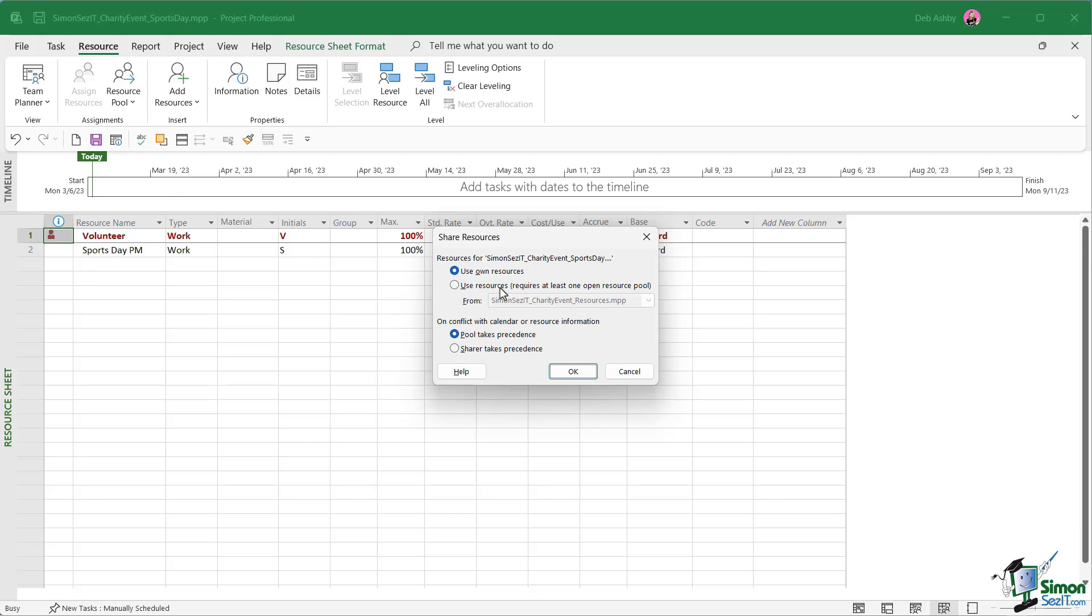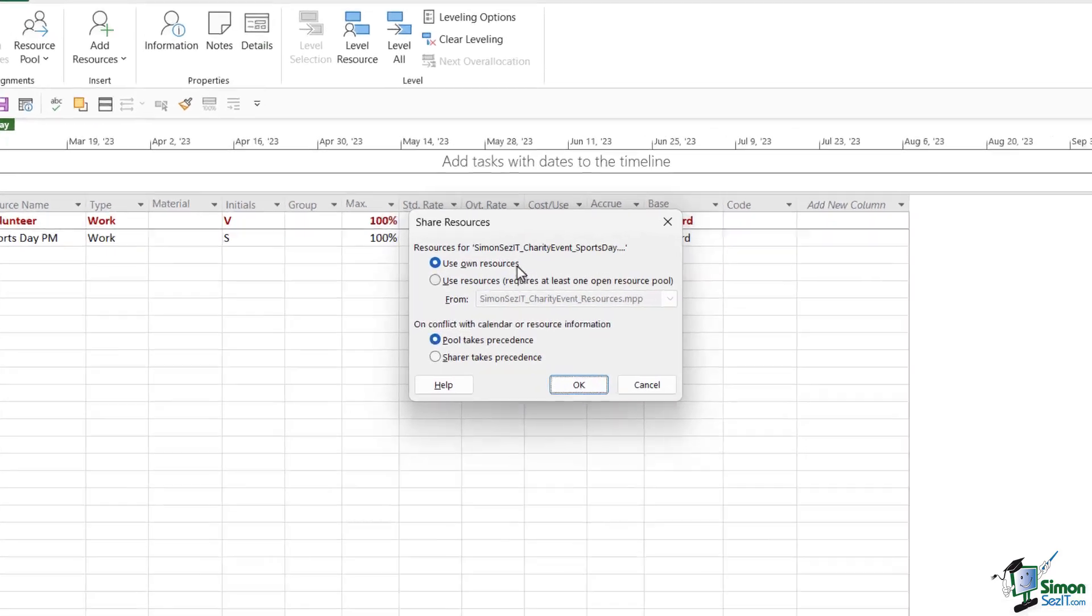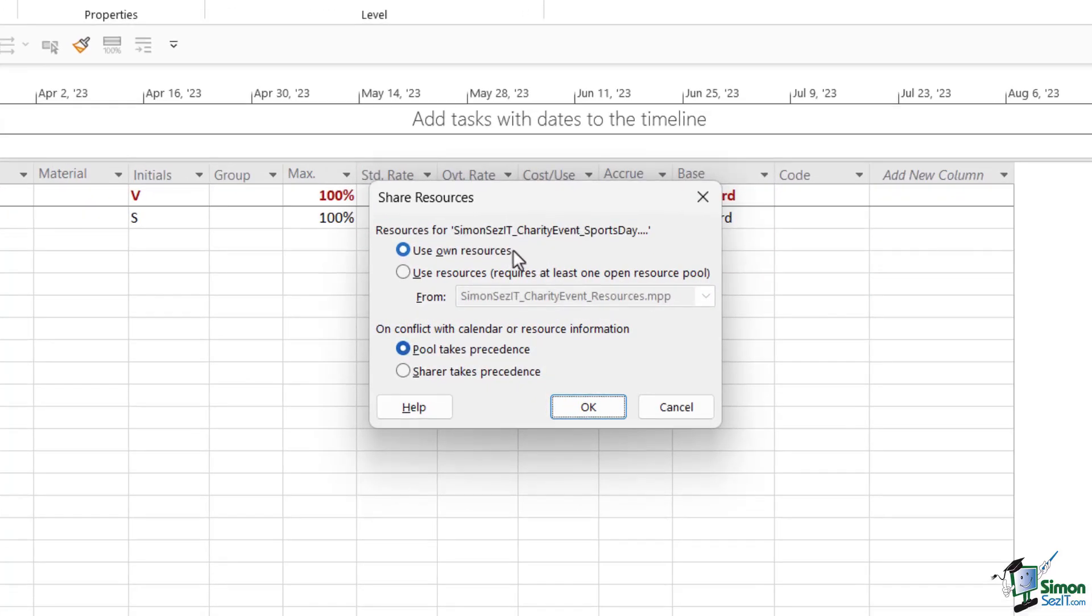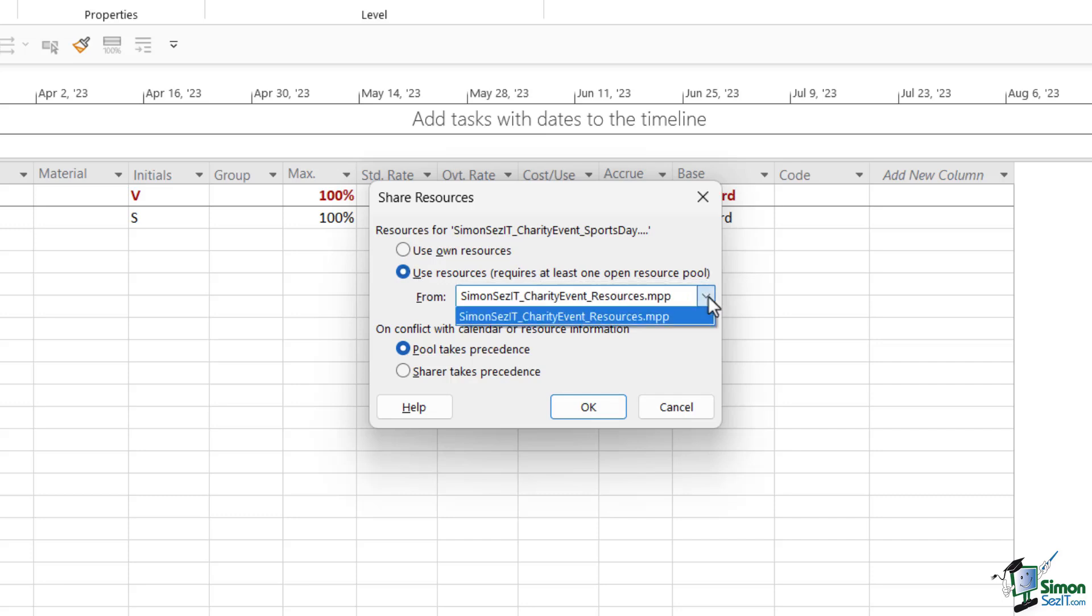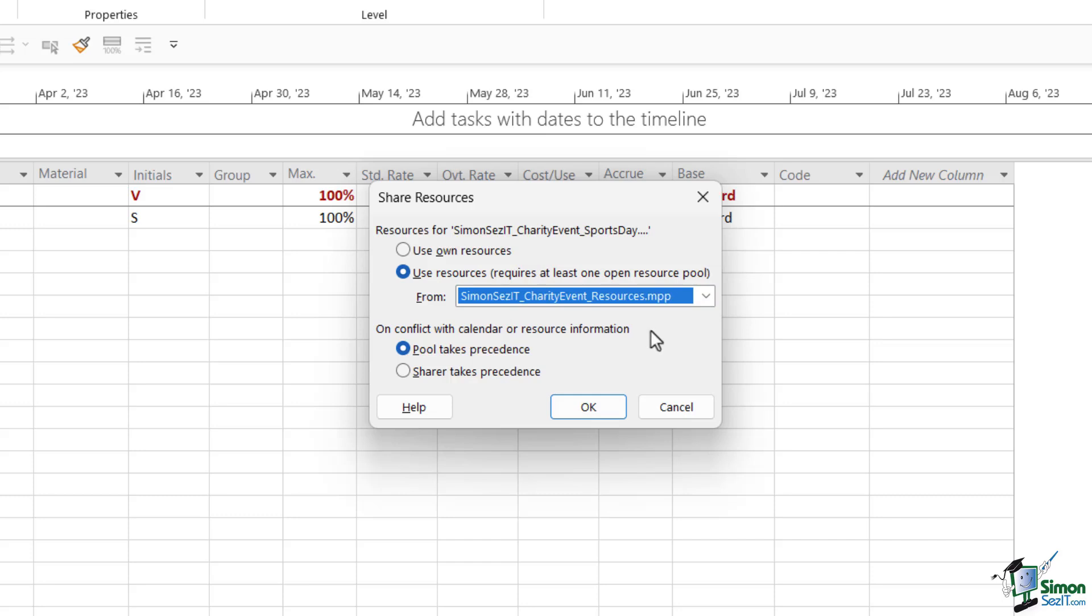This is where we get to select the resource pool. From here, if we choose the second option, use resources, we can then choose where our resource pool is located. The important thing to note here is that you need to have that file open in order for the dropdown to recognize it. I still have my resource pool open. There it is. Charity event underscore resources. This is the file we're going to be using. Then we have options for on conflict with calendar or resource information. The pool takes precedence or the sharer takes precedence.